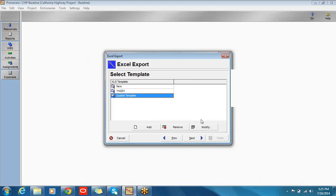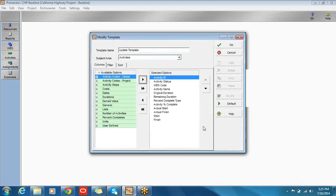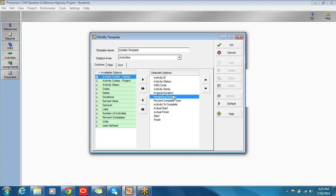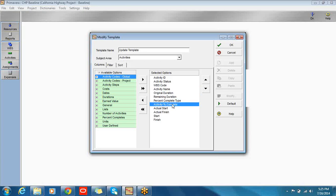I've already created a template. I'll show you what it looks like. Certain information is mandatory, such as the ID, the status, and the WBS. That information cannot be removed from the template — this is true for all templates. Everything else is optional, but some of this is mandatory for the purpose of updating the schedule. I need the remaining duration. I think it's useful to have original duration as well. I'm putting in activity percent complete, which we need.